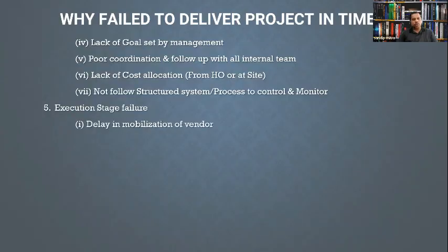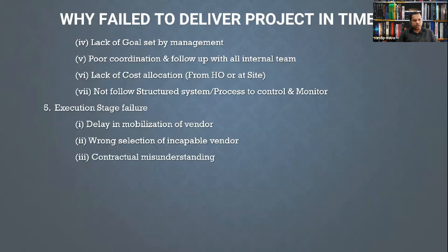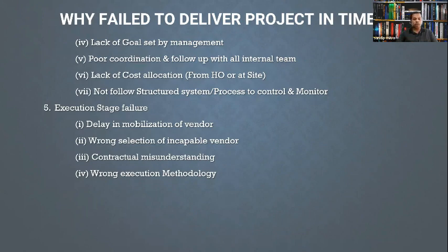In the execution stage, failure can come from delay in mobilization, wrong selection of an incapable vendor, contextual misunderstanding, and wrong execution methodology. In big projects, you need to finalize the installation methodology or method statement, which has to be vetted through the client or consultant. Only based on that approval can you execute in the field, and if that methodology is not proper, it becomes very time-consuming.